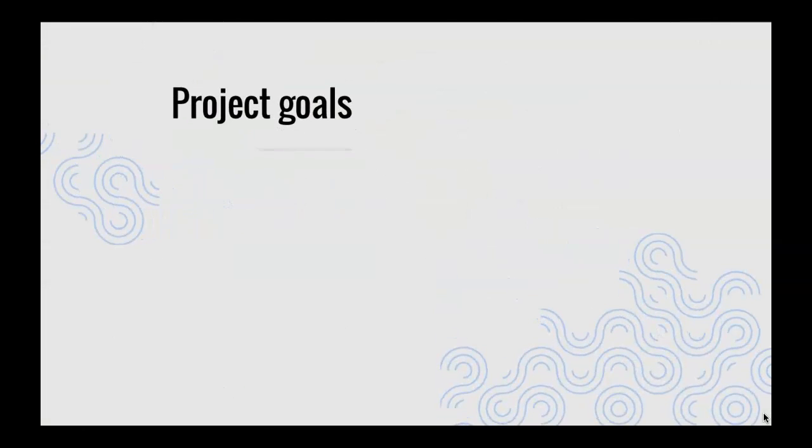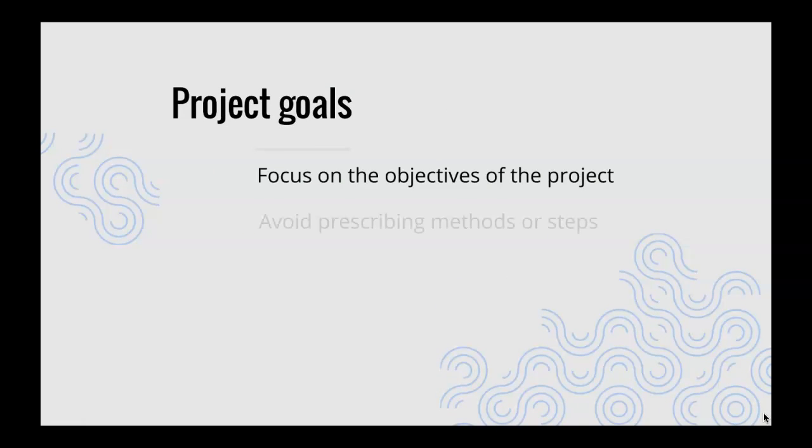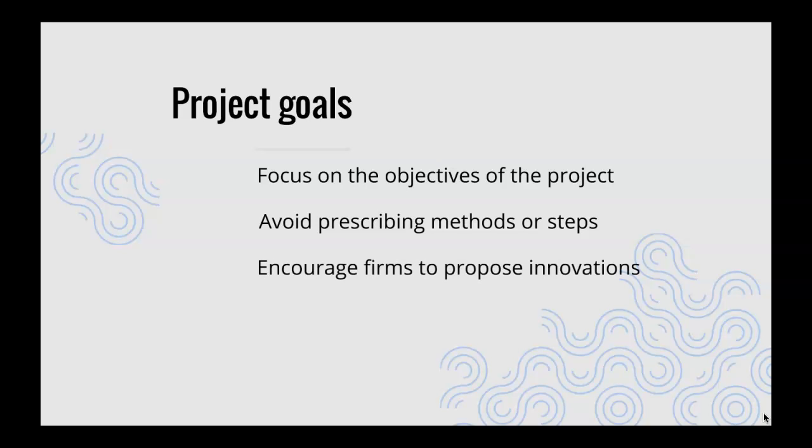When identifying the general scope, focus on the objectives of the project rather than prescribing the methods or steps to achieve the objectives. This allows firms to propose innovations that may improve the outcome of the project.